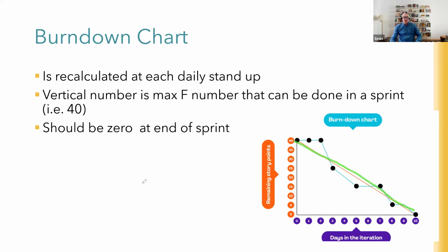So that's a burn down chart. There's also variations on this. There's the burn up chart. There's velocity charts, which just shows you getting better with every sprint. This is a sprint-based chart, but there are other charts which show you how much work you do every sprint, because the assumption is when teams come together for the first time, they're not as good at working together nor doing the work as they are, say, after 4, 5, or 6 sprints, and you'll actually get a higher velocity, and there'll be an optimum level that you will achieve with a high-performing team.